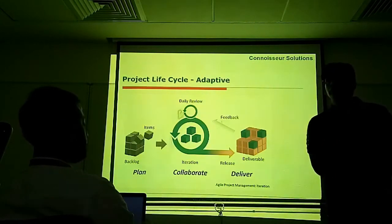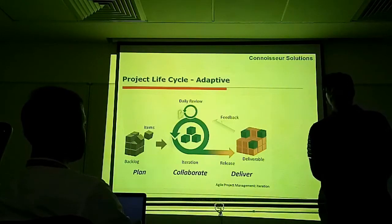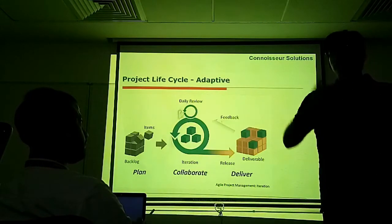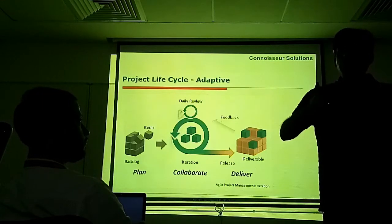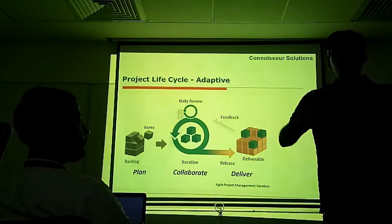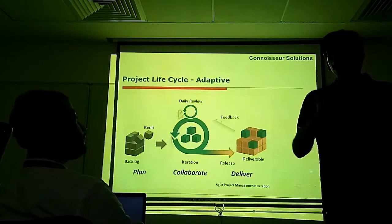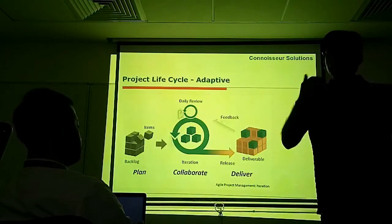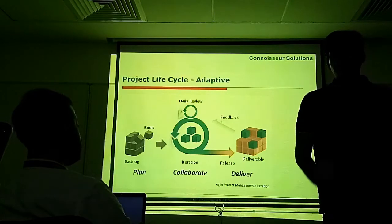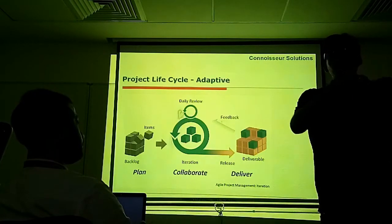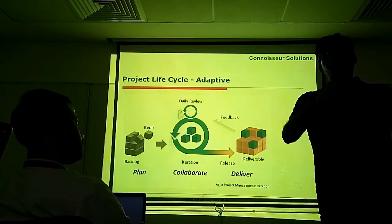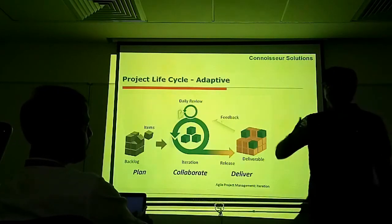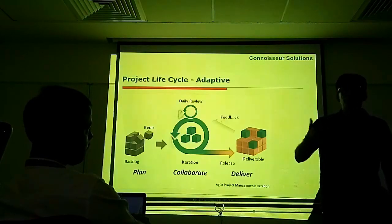Why is it called backlog? Why is it called backlog? Nothing is lagging back. Why is it called backlog? No, backlog is a scope to be delivered. See, product backlog is a prioritized requirement of the overall scope of the project. And the requirements will be delivered from product backlog. Requirements based on the priority will have requirements in sprint backlog from the product backlog. And every iteration will be delivering potential reshippable product.